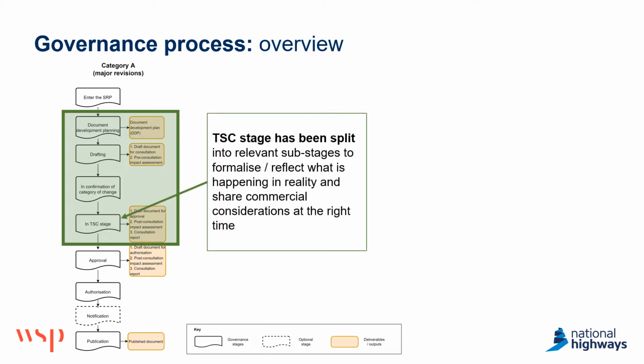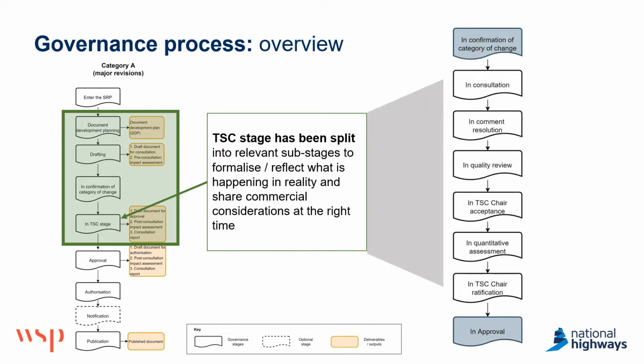A key improvement we've made to the process is that the TSC stage has been split into relevant substages for two main reasons. Firstly, we wanted to formalize and reflect what's happening in reality. We know, for example, that in this stage, we don't have just consultation, we also have other activities like comment resolution or ensuring that the final documentation is MDD compliant. Therefore, the TSC stage has been updated to reflect such activities and ensure that we are able to track them into JIRA for management purposes.